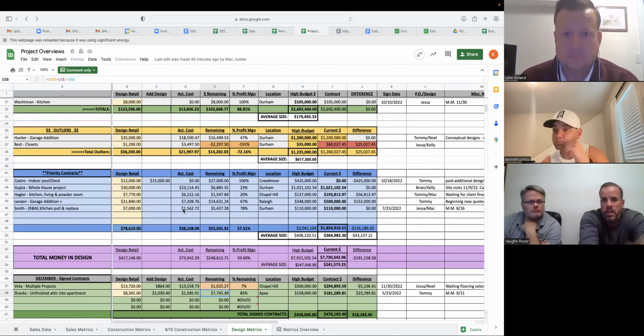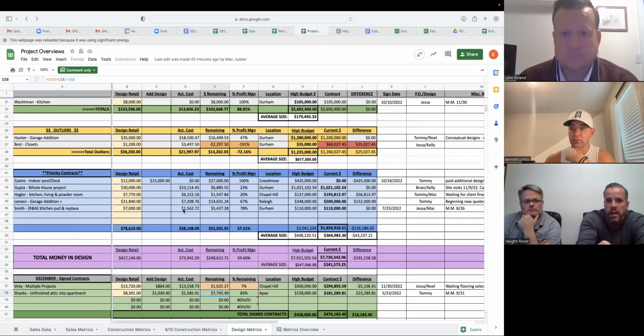So she updates this document, but then who else looks at this document and how often are they looking at it? The PDs look at this with our operations manager every Thursday when they have their PD meeting. I look at it every Thursday after it's updated. Got it. Okay. All right.